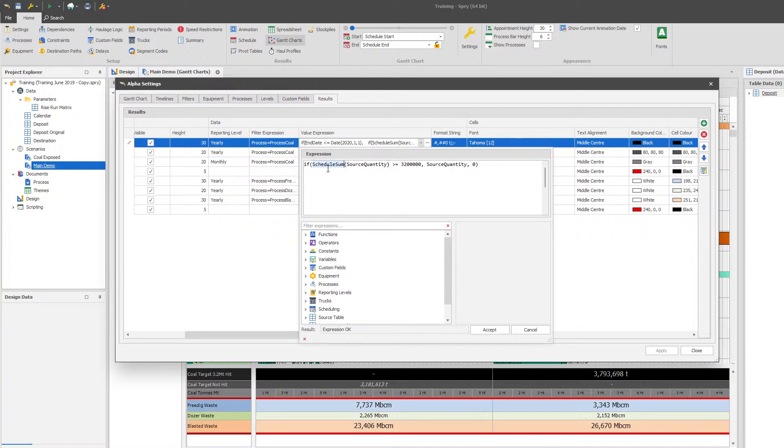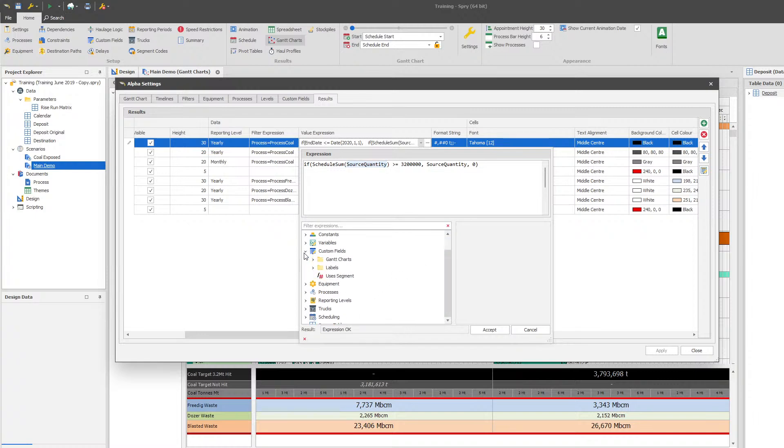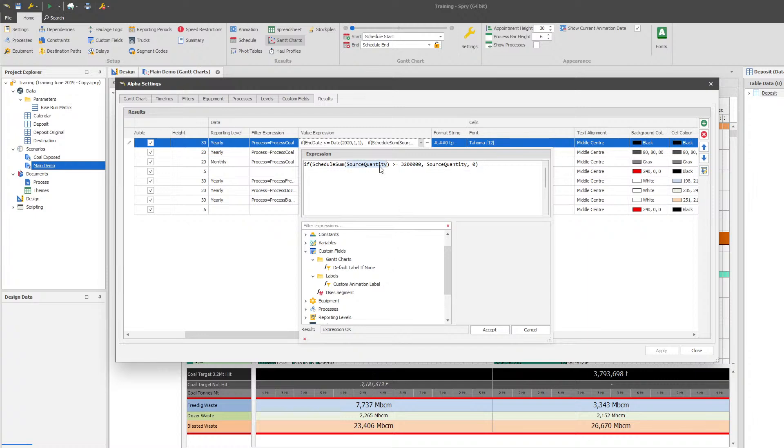So basically you're saying if the sum of the source quantity is greater than 3.2 million. Now I don't actually recommend using source quantity - this is a part of a longer Gantt course that I've been figuring out. I would actually strongly prefer that you use custom fields. Source quantity I generally rail against. This is good for a quick example. You're better off having a custom field for, in this example, coal tons or ore tons or the value that you're interested in. Source quantity is just a little bit dangerous because if you change it to mean something else, you have to then remember to go and update all of your different results as opposed to updating just a custom field.